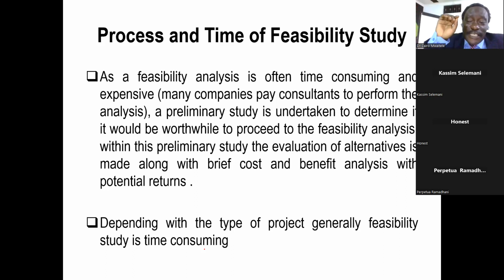To produce all those documentations, supporting documentation, the architectural design, the structural design, if it is construction. But for school construction, that's a simple school construction project to assess whether it's viable or not. Farming projects, that's simple. In 1 month, you can develop a feasibility study about farming, milling machines, timber projects, tailoring projects, maybe manufacturing, depending on the complexity of the manufacturing itself. You'll have to define that by yourself, but it can take a month to produce that report.